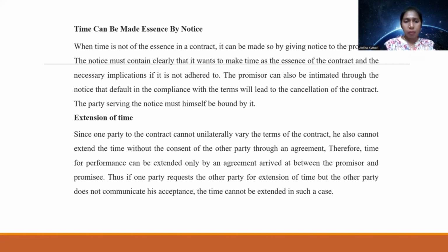Sometimes, if the performance of the contract is based on some fixed period of time and you are not able to complete it within that period, you can ask the promisor, by extending the time with the help of a proper notice or proper requisition letter.